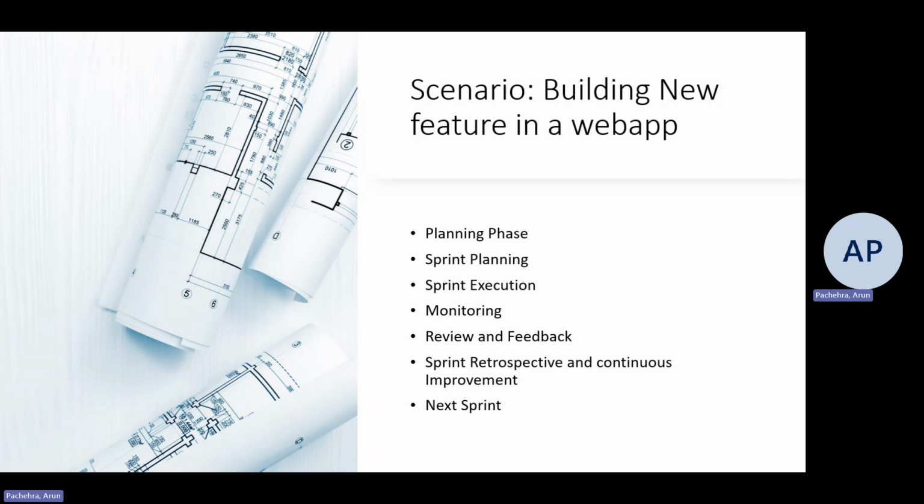The product owner updates the backlog based on the feedback and new requirements. The product owner refines and reprioritizes the backlog items in preparation for the next sprint planning session. And the same thing continues again and again and again. And hopefully it keeps on continuing, because it means our business is doing well.